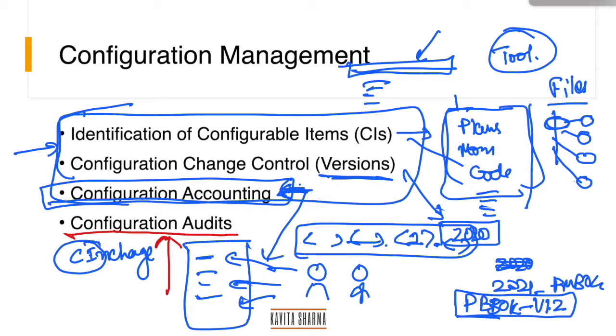So there are audits which would fall in place, maybe once a month or once in a quarter. Auditors are externalized who's gonna come and check whether the naming conventions are correct, whether right people have the right access or not.